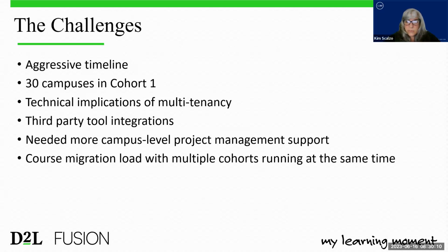With regard to third-party tool integrations, we had a very large volume to start. You saw the numbers. And campuses had varying existing contracts that we had to navigate and work through. There was also very little documentation to demonstrate compliance with EIT accessibility and security requirements. That required a whole new work stream and a set of processes that we did not plan for and have had to stand up. And then, as Tracey mentioned, not all vendors understood the implications of multi-tenancy, so that we had to work through with them.